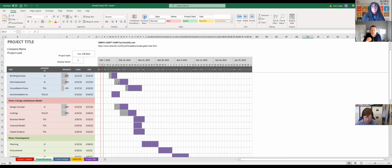Because when it comes to not-for-profit organizations, where you're dealing with public funding or grant aid, you've got to look at your schedule in terms of how it's going to tie in with the drawdown of grants. So if you're not putting in proper schedules, and let's say you're doing a phased payment system with a contractor, and you're not managing the time properly, you're going to run into problems when it comes to drawdown of grants that you're going to miss. You don't want to be late getting an application or a drawdown file in. There's a delay in getting the grant paid out, then there's a delay in the next phase starting. So it can get out of control very quickly.